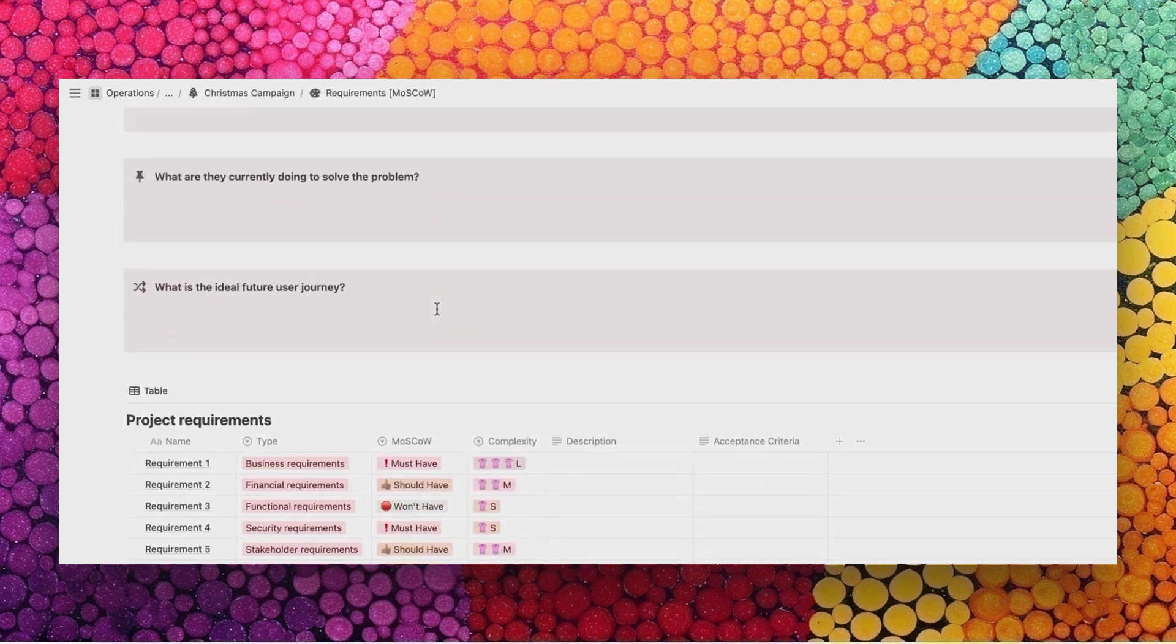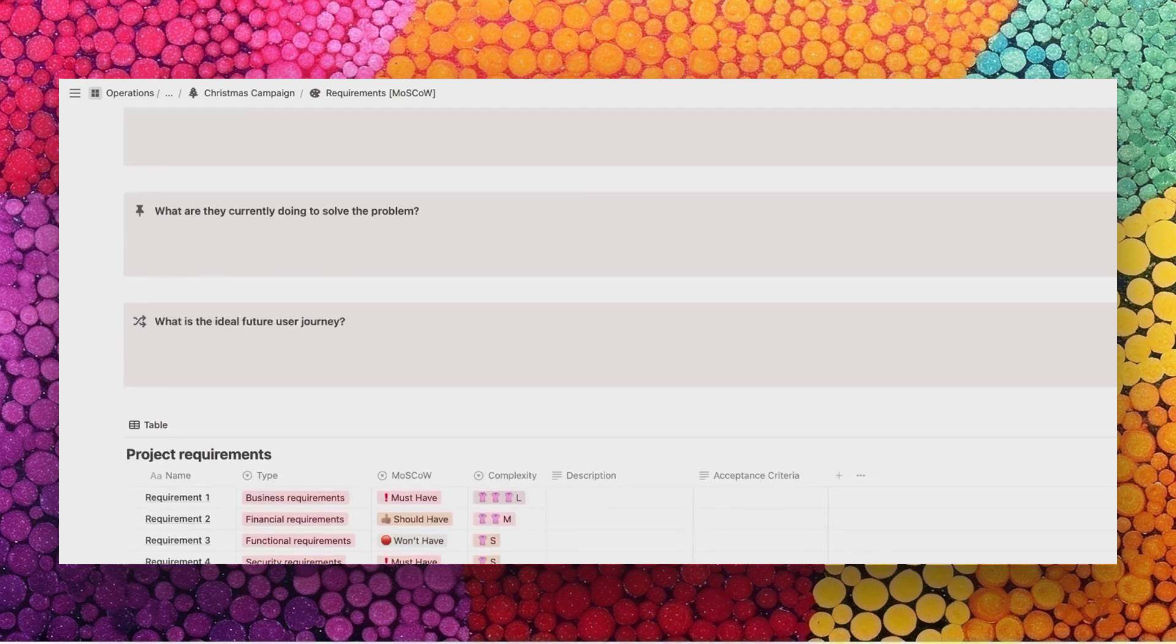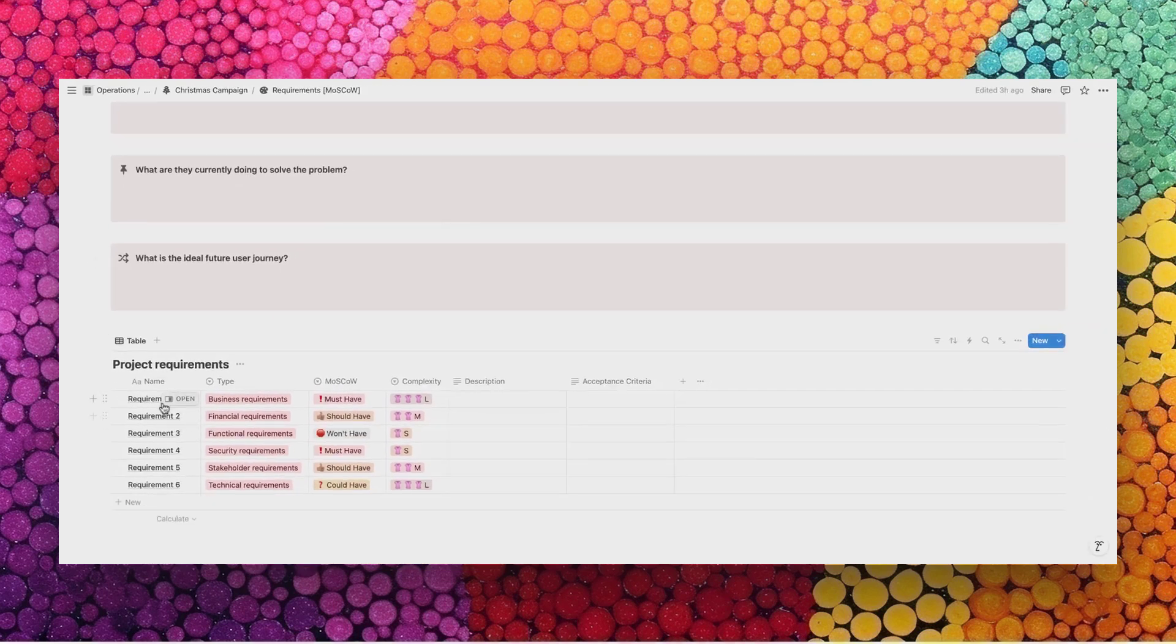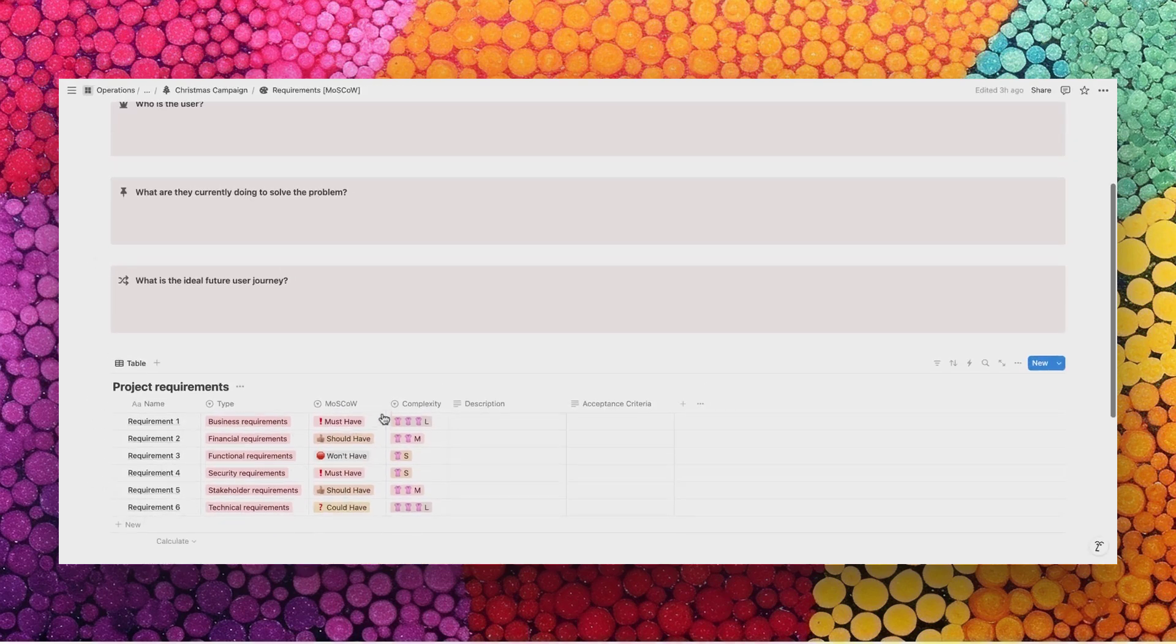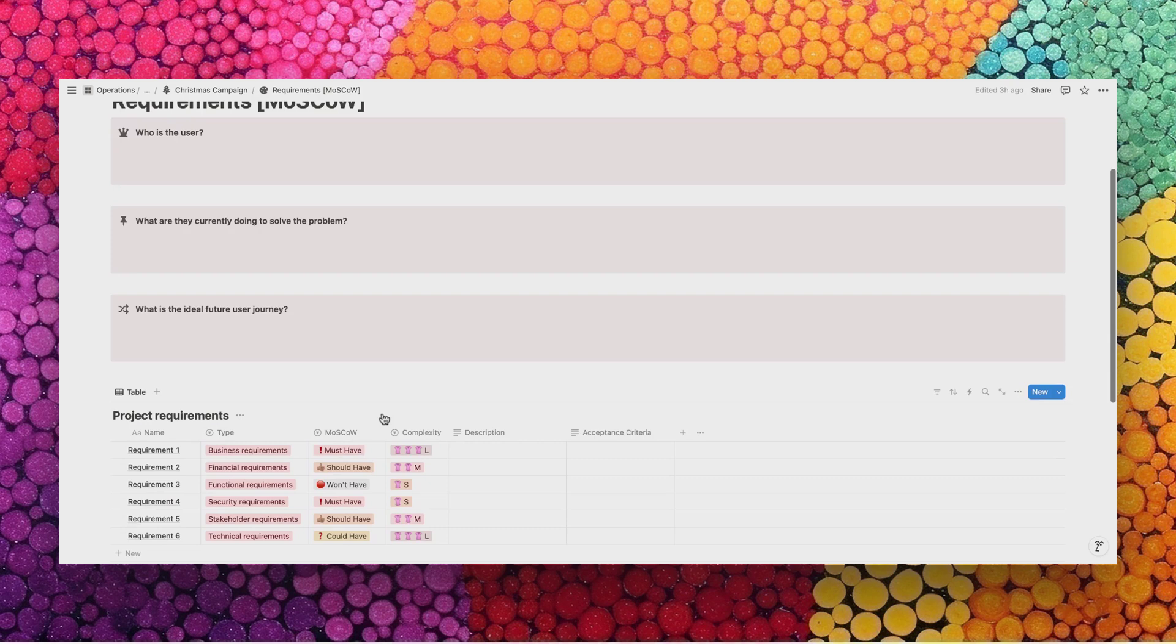For example, within the requirements we're using the Moscow technique. We can define the functionalities of our product or the requirements for an event. This template helps us then order each requirement by importance and complexity so we can make informed decisions on what we should do and what we won't do.